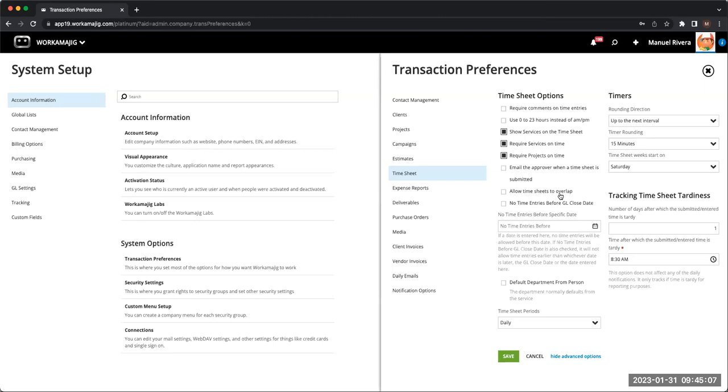And we tell them, yes, it is a rule by design that if you bill or close your project that's linked to a timesheet entry on that timesheet, it locks the timesheet. So if you need to make a change, you have to undo the billing, undo the project closing, or a transaction has been billed. And clients, you guys know, that's a lot of work. We don't want to do that, and we get it.